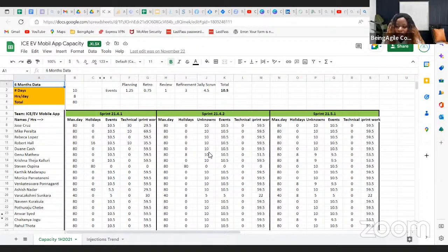The total of that will be your total team capacity. Now that you have the team capacity, you will use that capacity available and gauge it against the capacity required to do the work, to see if that commitment is realistic or not. And then you make adjustments on your plan, on what you're bringing into the sprint or what you're finally taking to work on in the sprint, based on that information.